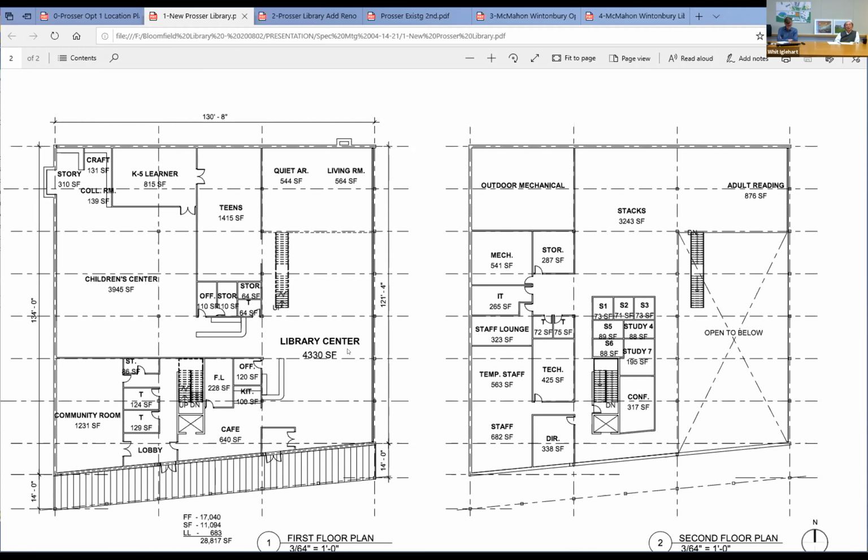So not proportional. So my recommendation is, if you really wanted to reduce the cost, you have to go substantially, like to 26,000 square feet. Then you might reduce building construction cost by 10%. That's your decision. But our recommendation is let's try to stay below 29,000 square feet and stay with the budget down proposal. But it's your decision if you want to really lower the budget.